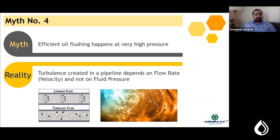Myth number four: efficient oil flushing happens at very high pressure. Flushing happens because of turbulence, and turbulence is created by velocity which generates flow rate in the system. Pressure is a byproduct of flow rate going into pipelines — it is not the driver of effective flushing.